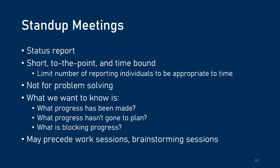Another useful thing to have is stand-up meetings. In a stand-up meeting, you want to keep these very short and to the point — the purpose is just to have a status report. You want to limit the number of people reporting, though you might want to rotate who reports week to week so people get exposure to the process. Ultimately, this is not a time for long drawn-out problem-solving, but rather covering the progress that's been made, what's been blocked, and what's causing the blockage. This might precede work sessions for efficiency, so you don't have to schedule multiple separate times — it can be a lot to ask for people to show up to four different meeting times for one project.